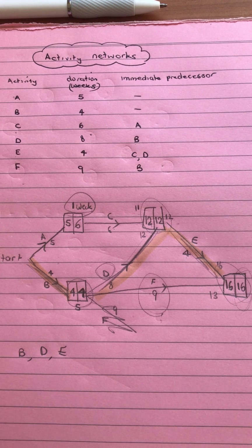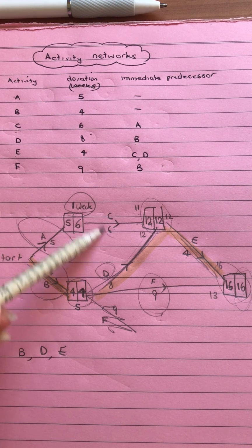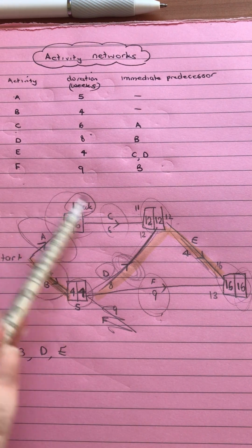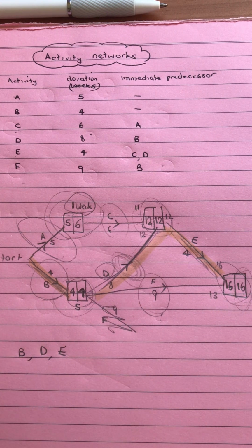These ones can be a little bit tricky, but follow those steps, and do multiple versions if you need to. Make sure you've got those features like the letter and the time on those lines. Make sure you've got the direction so you know which way you're going, and make sure you're putting those boxes in so you can show the forward and backward scanning.